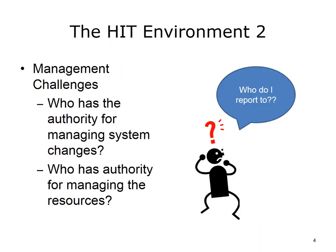For instance, a functional manager may run the billing department and all the resources in that department. But a temporary project manager may be hired to manage a software upgrade project in the billing department. This presents challenges for employees of the department. They'll want to know who has authority for managing the changes, and how knowledge transfer will take place from the project manager to the billing department staff. The project manager is ultimately responsible for the outcome of the project, but the functional manager owns the resources—human and otherwise—that must be committed in order for the project to be successful.